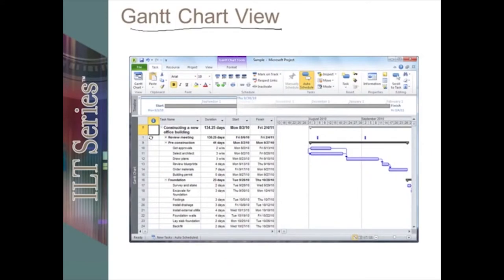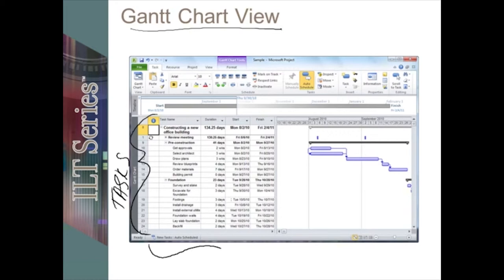Gantt chart view allows us to work within our tasks. Because if we're having problems with resources, we do typically switch to resource views. But in the majority of projects, it's really the tasks that are starting to drive it. So in the tasks, we have a division of screen. This right here is a table, and it's known as the entry table. By default, the table is where you enter in all of your tasks.